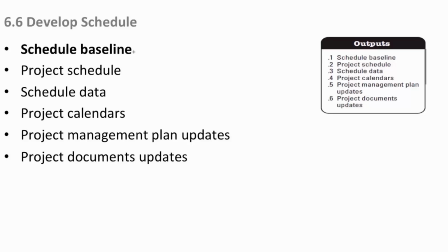The project schedule, which is the living document that we use day to day to take actuals and put them into the schedule. If it took 2 hours to do a task and the task said you only need an hour, okay, well now you've gained an hour in your project schedule. That may or may not change your critical path depending on where that activity is in your network diagram, but it might. And likewise, if it's a 2-hour task but it took you 5 for some reason, as an actual, your project schedule would reflect that, and that may or may not affect your end date. But certainly your schedule baseline does not change. It still is 2 hours and 2 hours only, regardless of what the actual is. And that's what you're trying to manage against.